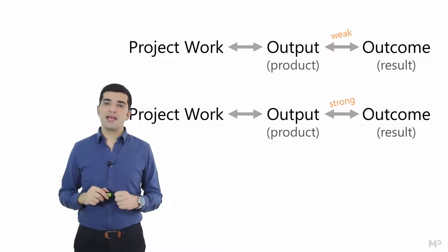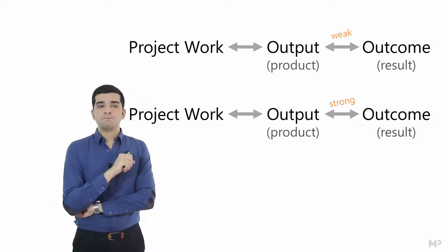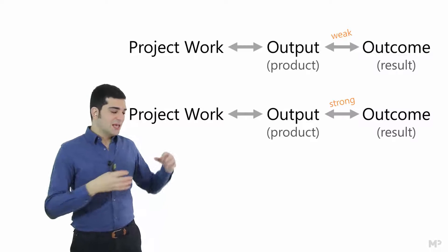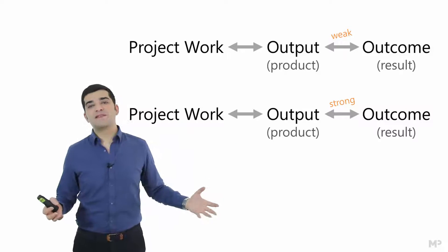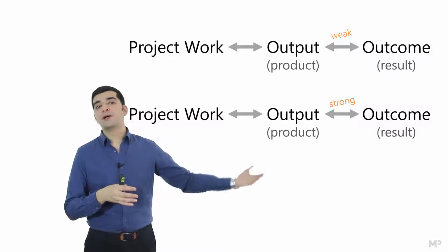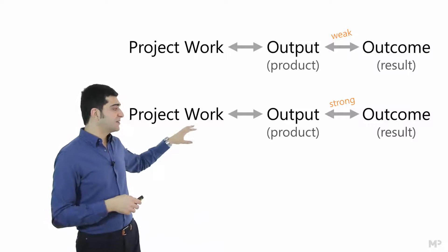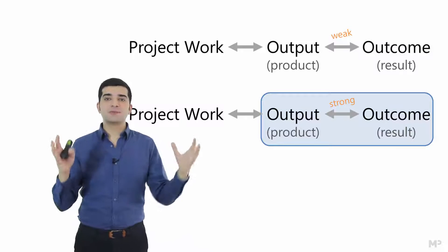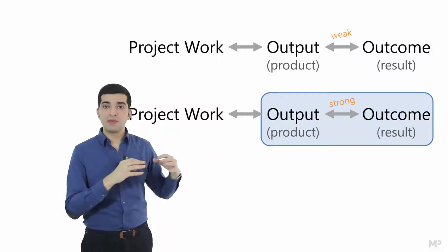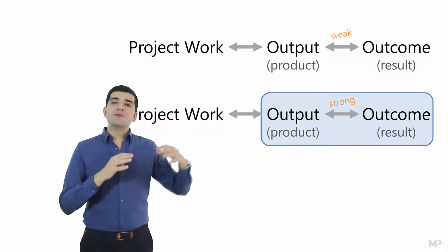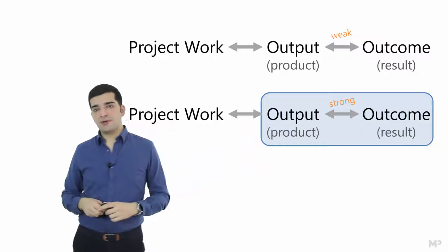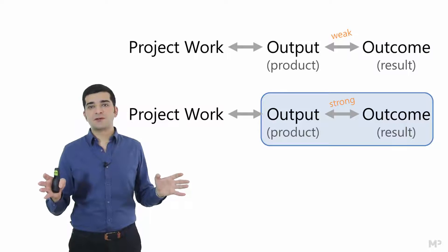Sometimes we have strong relationships between outputs and outcomes, which makes everything really simple. Think about the hospital: the relationship between the hospital and improvements in healthcare is strong. We can be sure the product creates that outcome — it's been like that for hundreds of years and will be true long after your project finishes. So we can treat them as one thing; once you choose the best product, you can focus on it and be confident that as soon as you create the product the outcomes will be generated.